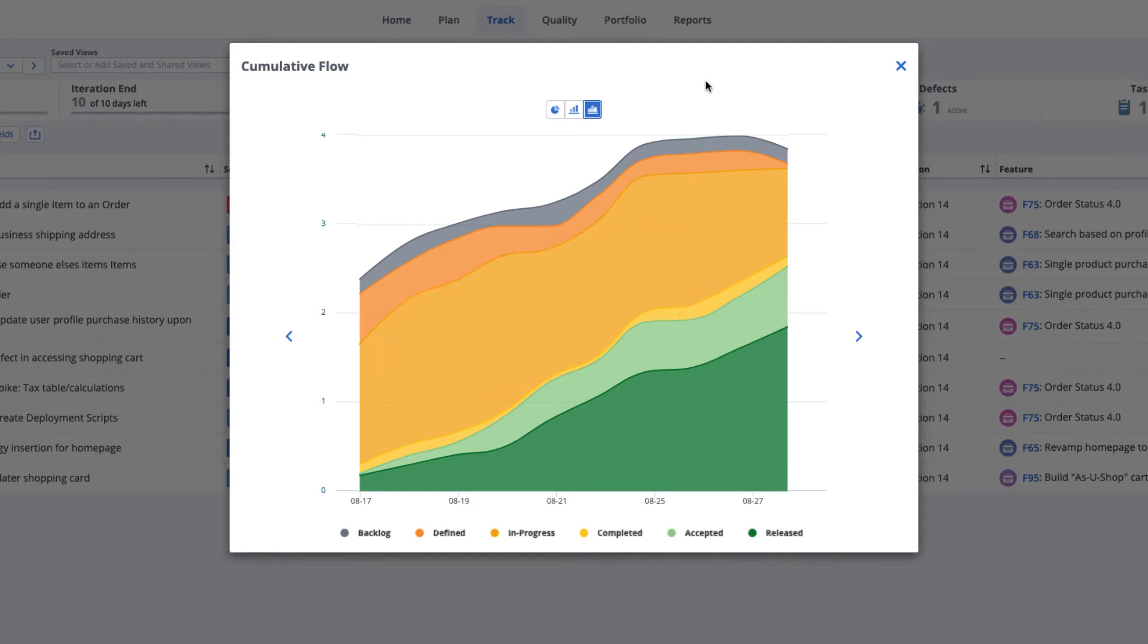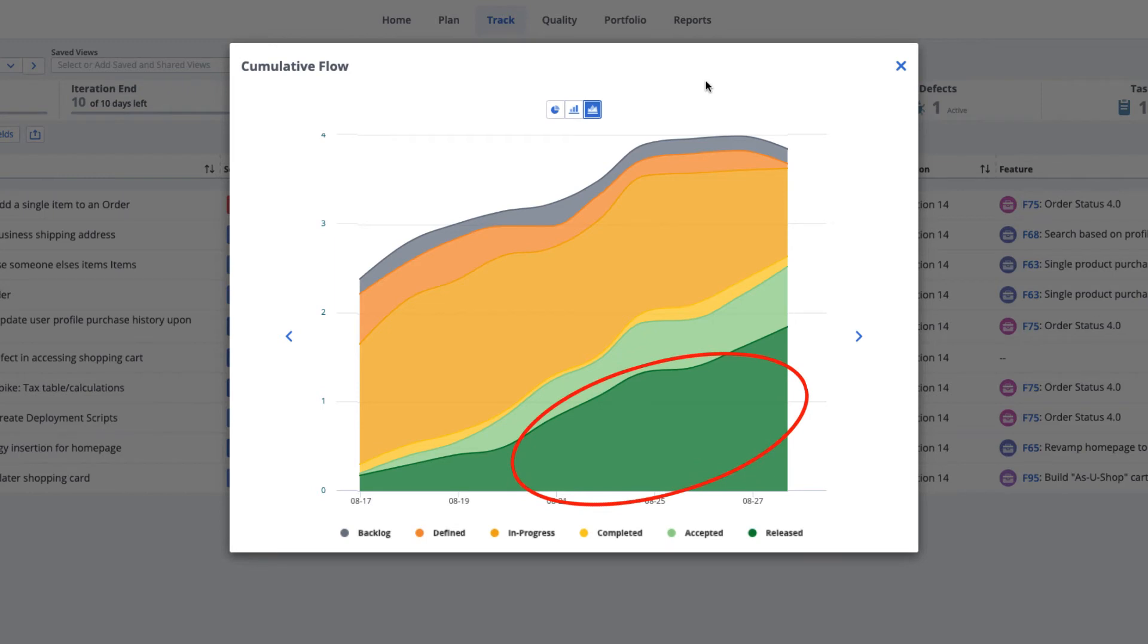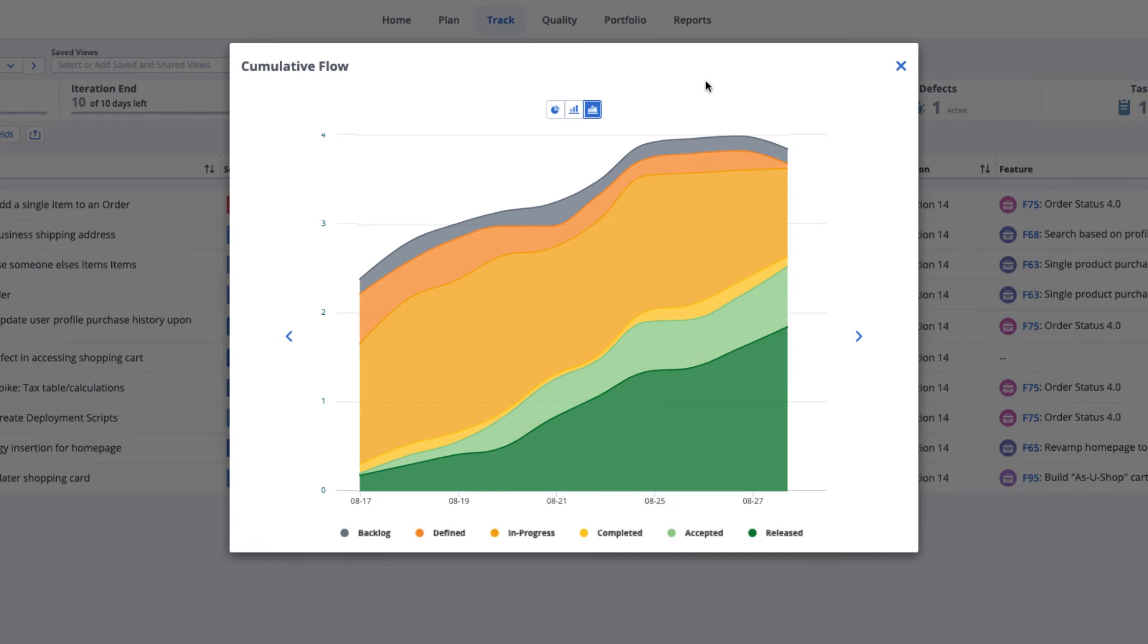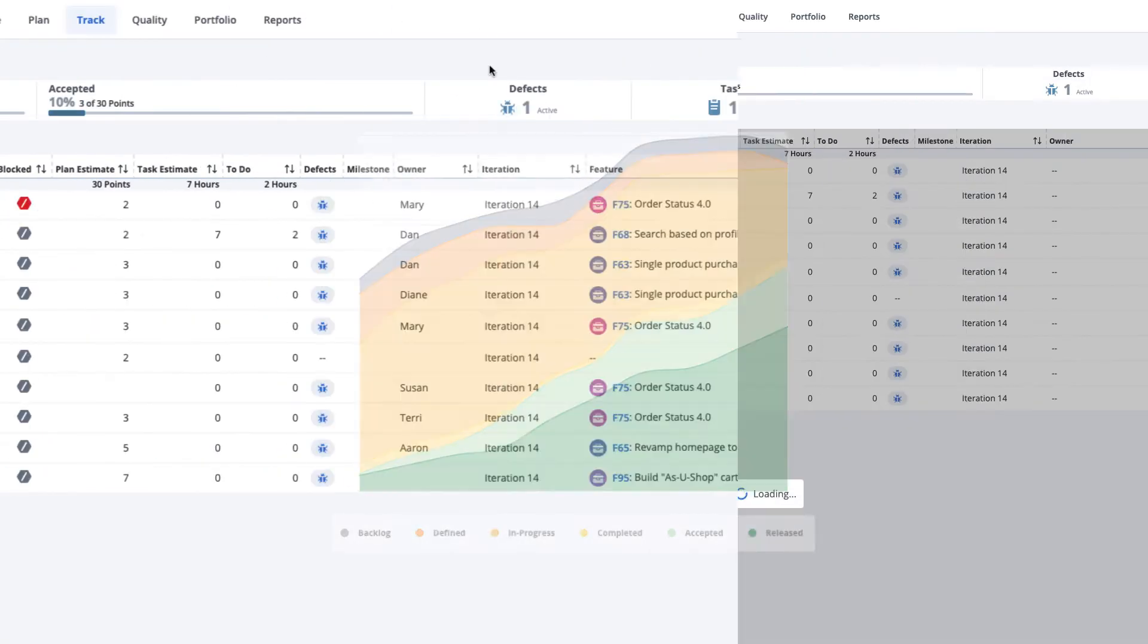You'll see from the very narrow completed band that the work was accepted almost as soon as it was completed. But then, as time progressed, it was not released right away. Although there are sometimes good reasons for this, it's best to release accepted work as soon as possible to avoid stale code that must continue to be merged with new changes as it awaits release. This code can become problematic if it's held for too long.